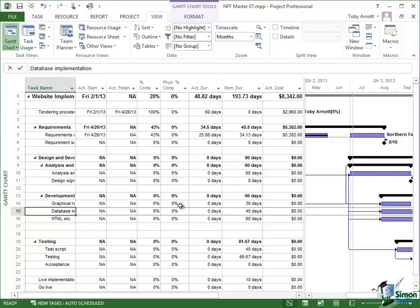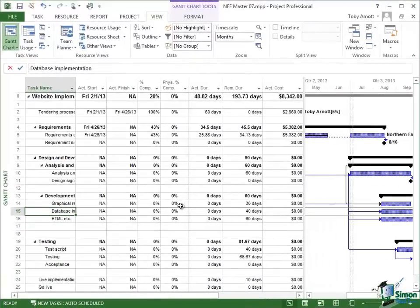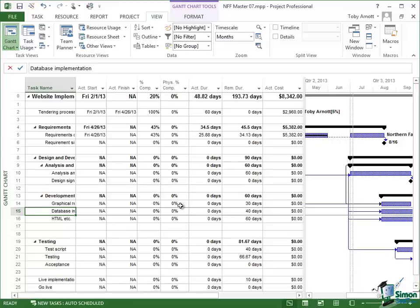Bear in mind that when you have costs associated with the tasks where the accrual method may be start or finish or whatever that will change that pattern accordingly. Basically when it's working out percent complete it slices up the duration according to how far you are through the duration of the task. If in fact for one or more tasks you want to be able to record a more accurate reflection on how far through the task you are, you can define a physical percent complete and manually enter that. One way of manually entering it is to enter it in this tracking table.